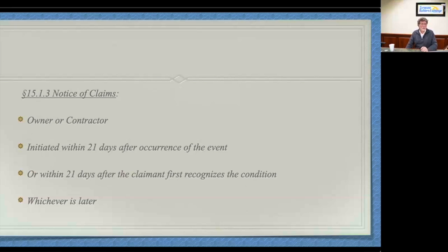The law in New York State is becoming more and more clear, with each passing year, that these notice of claim provisions, fair or not, can defeat a claim. We were involved in a project against DASNY for an electrical contract. Like so often happens when you're on the MEP side, that ceiling space might show this much on the spec or on the plans for working space. But then when you get there, it's like that, and the plumber and the mechanical have gone ahead of you and you're the electrical guy. So the electrical guy incurred additional labor costs installing cable tray and installing cable in the tray. Common sense. It's harder to work in a small congested spot than it is in a larger, less congested spot, MEP. Okay.